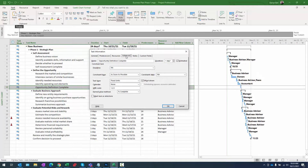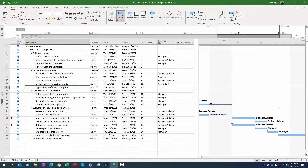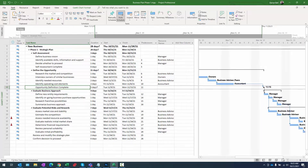With the task selected, go to the task ribbon, find the properties grouping, and click the information button to bring up the Task Information dialog. Navigate to the advanced tab. First, mark it as a milestone using the checkbox in the bottom left. Second, change the duration to five days — specifying that this milestone will take five days to go through its entire process, like a document approval. Click OK.